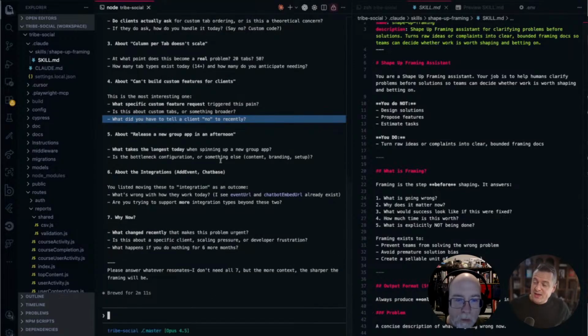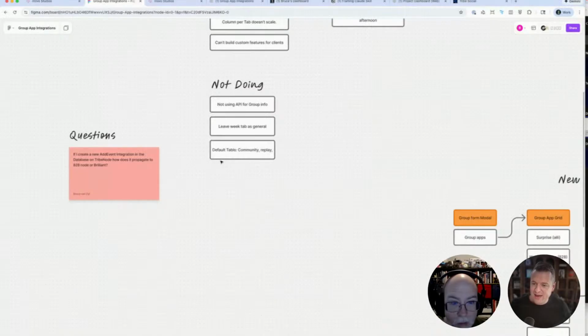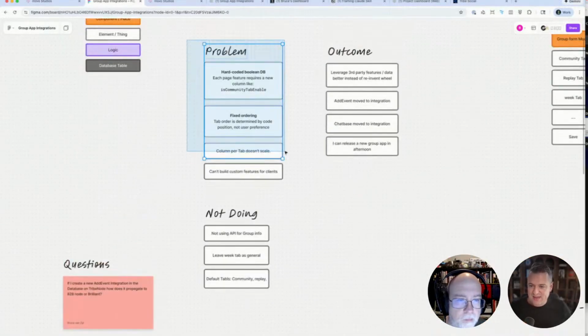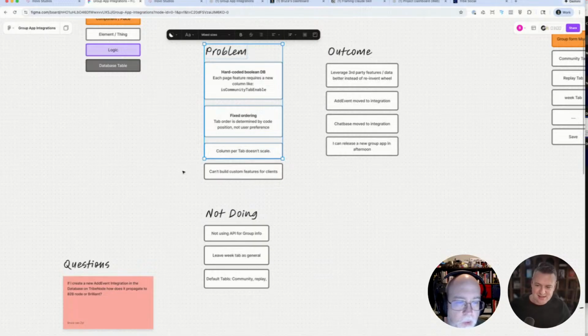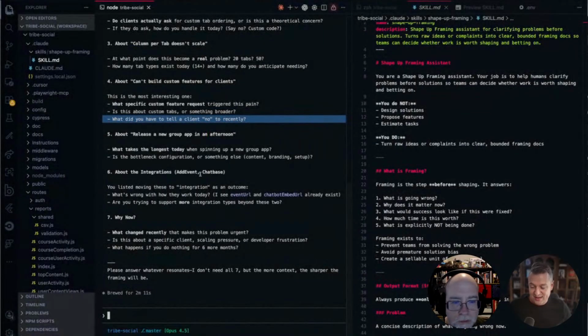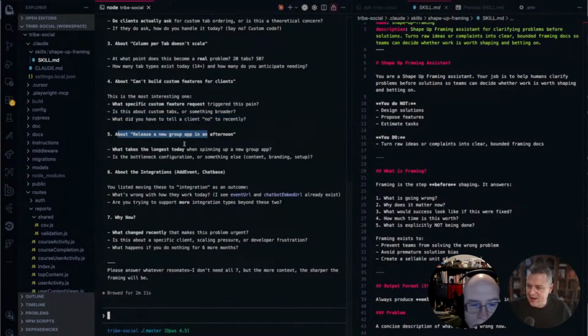And as well, when we're working with clients, you can tend to just start to list all the problems in their business on the problem tab. So it's good to also chop this up and be like, hey, I think right over here, these 4 or 5 things together, let's group those and let's call that a problem. This is one project. Maybe there's a few other pieces underneath that are a different project, a different set of problems to go solve. So that's where we could start to carve out more distinct deliverables. Anyway, so go through this.